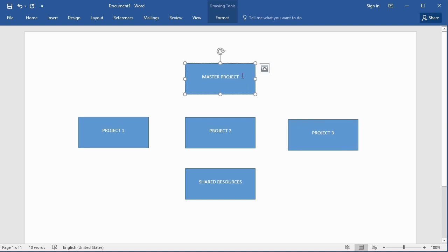Now, the biggest advantage comes if there is an interdependency between any of these projects. Perhaps towards the end of project 1, we are then able to plan to start project 2, and that's what will decide the kickoff for project 2, regardless of project 2's start date. So effectively, it will be dependent on project 1. And the same for project 3. It could be dependent on project 2 or even on parts of project 1. But we'll see mechanically how we can do that. For the moment, we need to just know that we can do that.